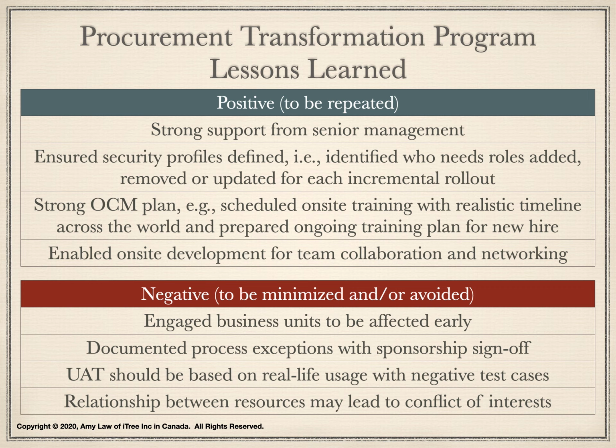We should have identified more real-life test cases for user acceptance testing. We should have worked with users from different areas for broader representation and clearly articulated the purpose of testing and expectation. We should have requested testers to build their own test cases based on real usage. We should have established negative test cases to break the system so that the application can gracefully handle invalid input and unexpected user behavior. Finally, we should have incorporated the test cases as demo and training materials.